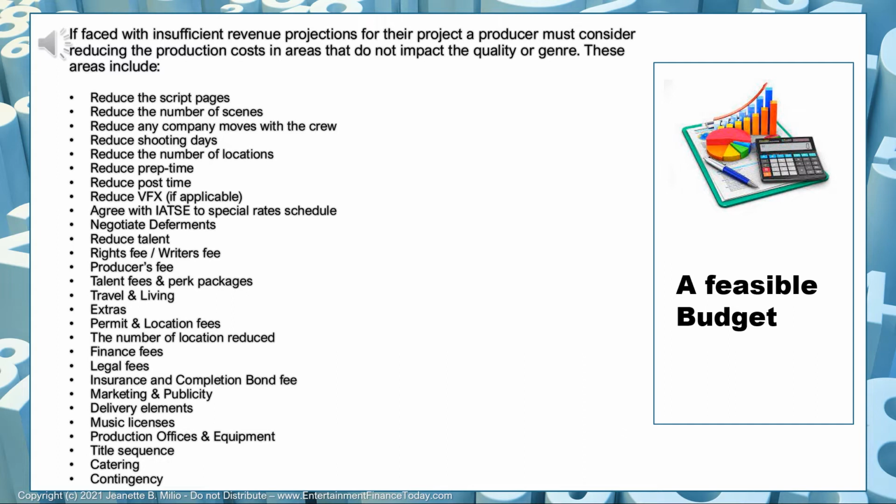So if you have a movie that's a 90-minute movie, that script should be 110 pages long. If it's 120, the likelihood of there being some extra pages that you can cut is pretty high. So look at your script and keep it around 110 pages max. And then look at the scenes. How many scenes do you have?